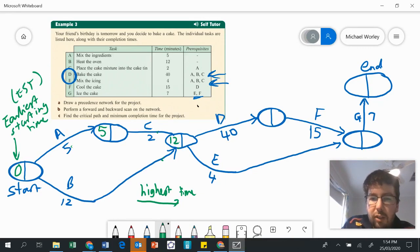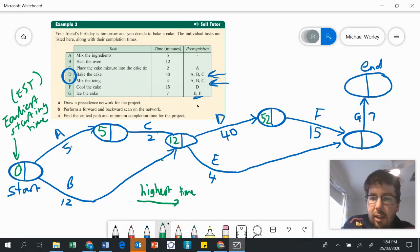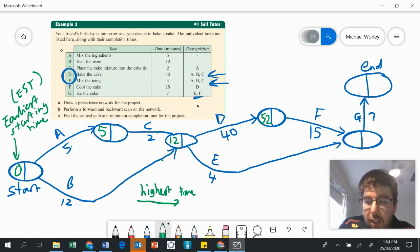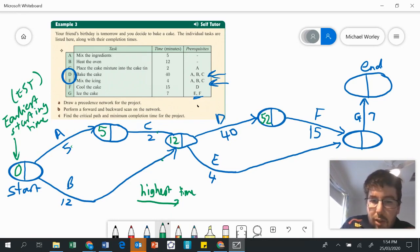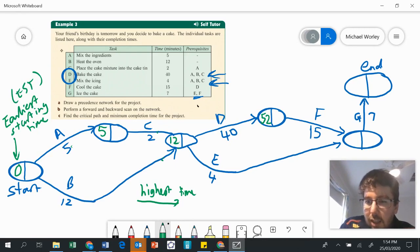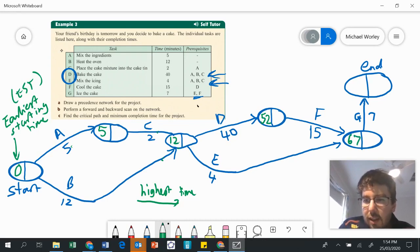12 plus 40 — this is easy because there's just one link — 12 plus 40 is going to be 52. Then 52 plus 15 is going to be 67 minutes. But we also need to look at the other link here: 12 plus 4 is 16. So clearly the bigger number is 67. 67 plus 7 brings us up to 74 minutes. We've done our forward scan, which means it's going to take a minimum of 74 minutes to complete.